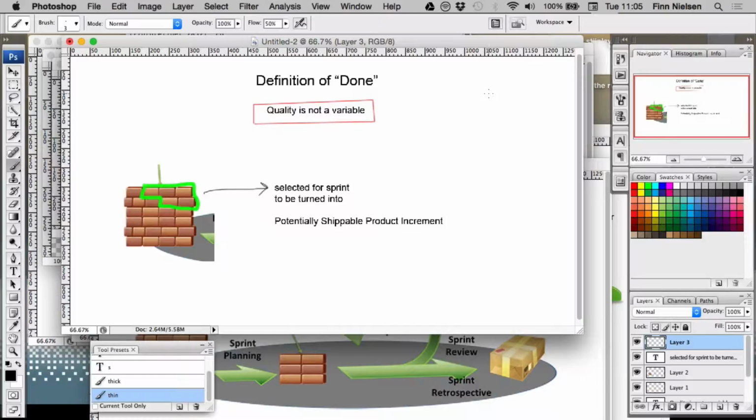So every project, every team usually has a different definition of done. And you need to think carefully about that, because it impacts a lot how much work you can do. Because the higher quality you want, the longer time it's going to take to get there. Like testing takes time, and fixing bugs and stuff like that takes time. So it depends on the needs of the project, of course.